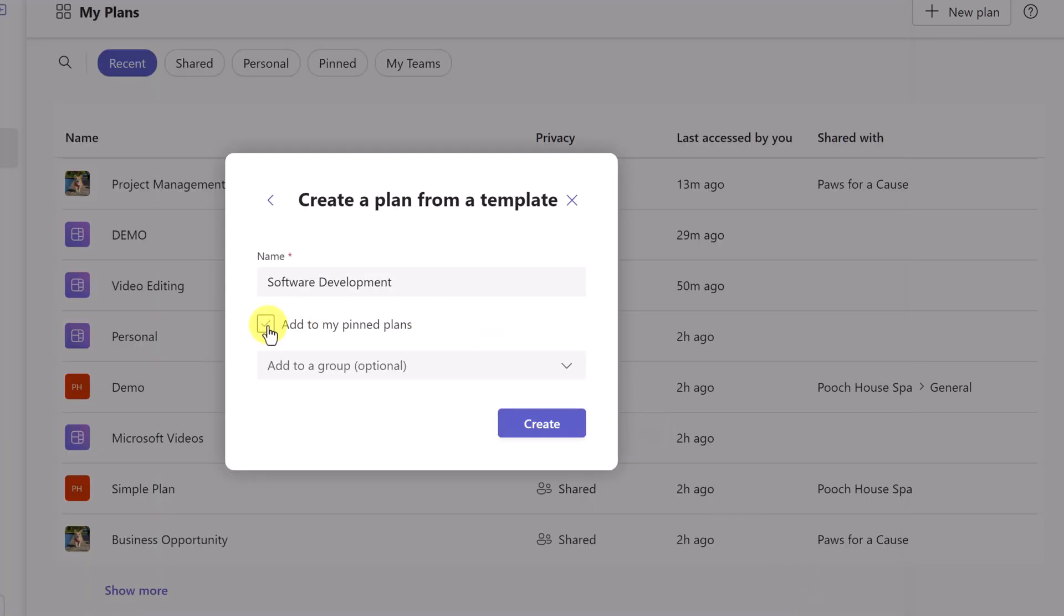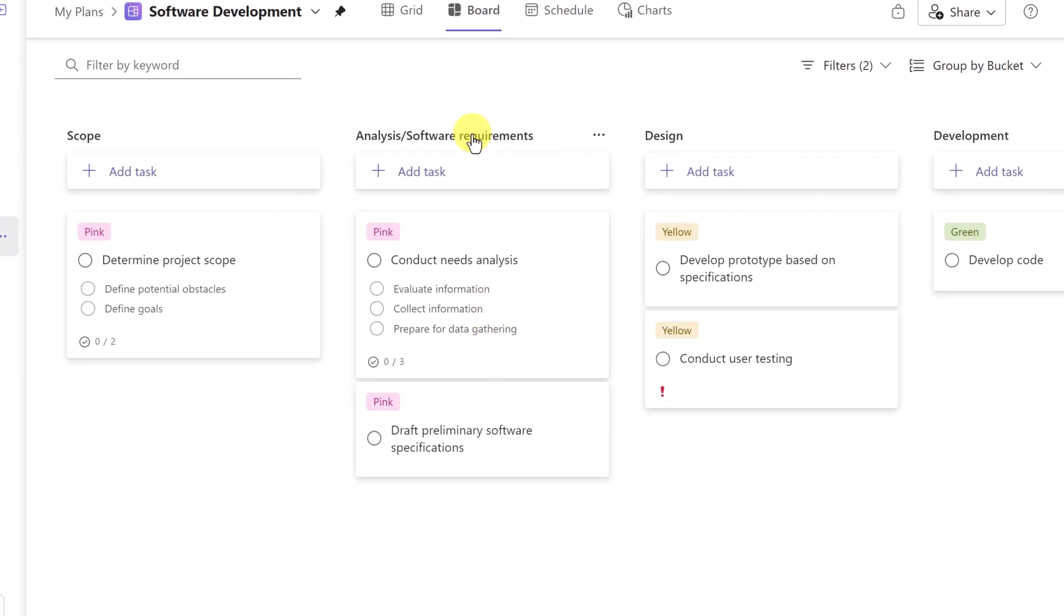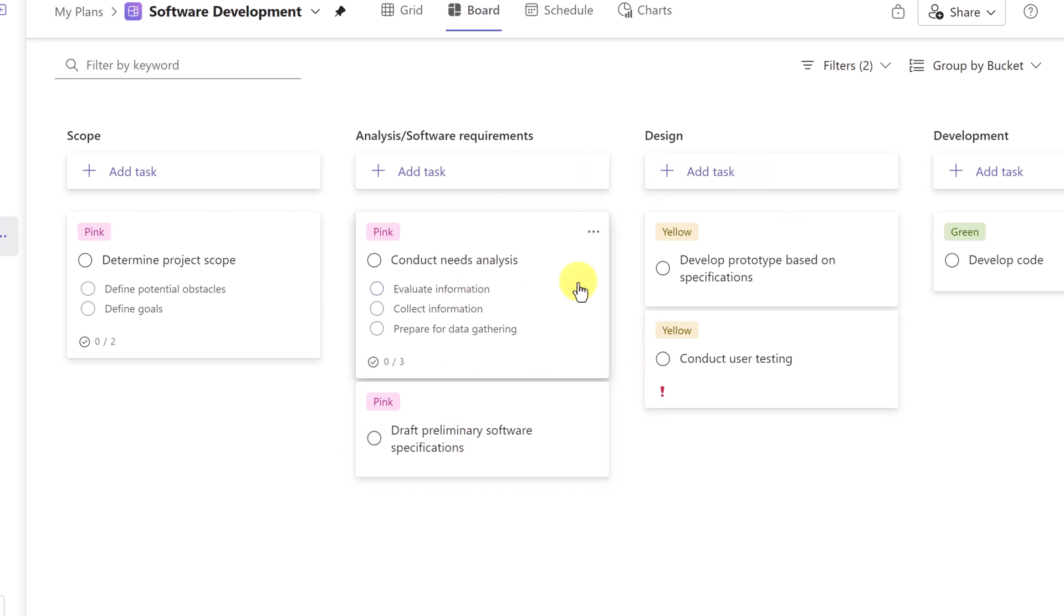I could add it to my pins, pick my group, hit create. It's going to create, and as the Kanban board opens up, you can see that I have my buckets already titled and I have some different tasks that are already in here set up, and this can be all modified.